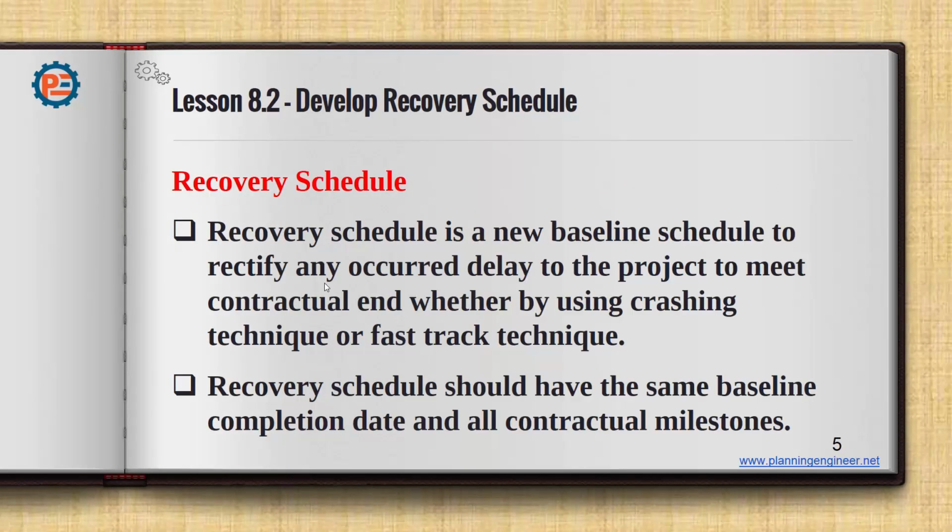As we said in the previous lesson's introduction, with the recovery schedule we are creating a new baseline because of our delays as a contractor. The recovery schedule should have the same completion date as our baseline. So we keep these two points in mind while developing the recovery schedule.